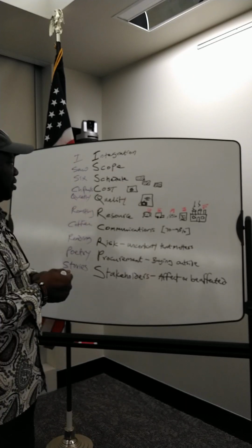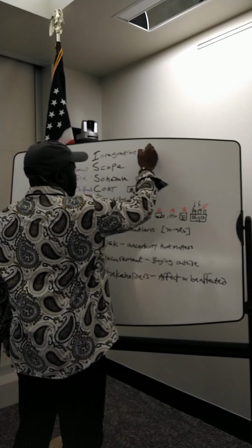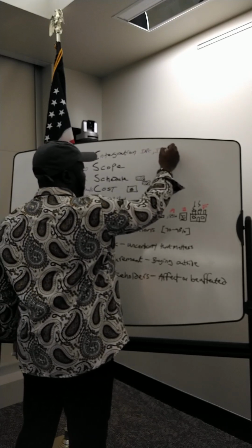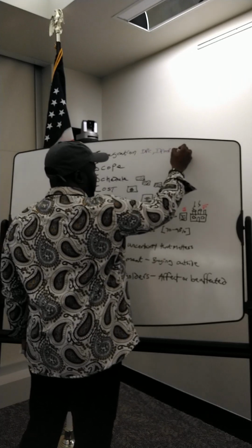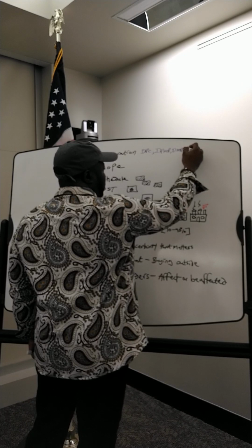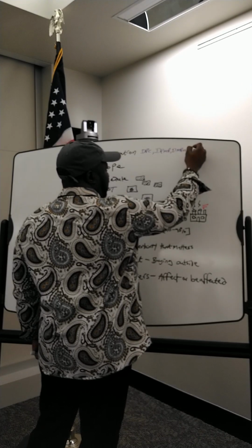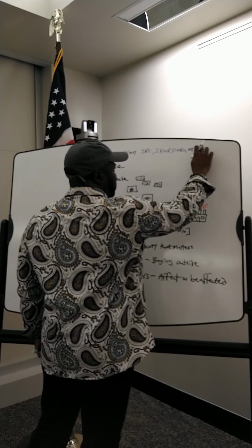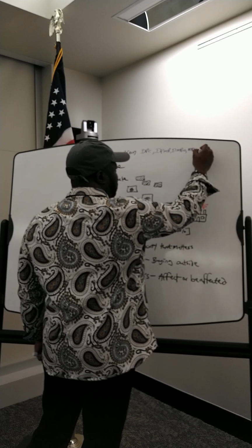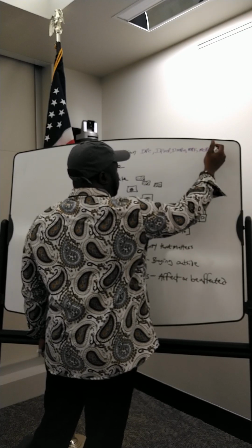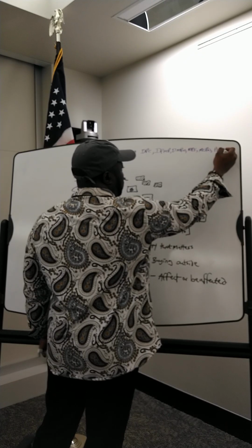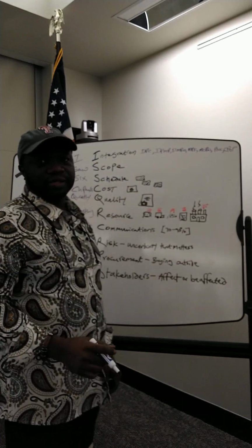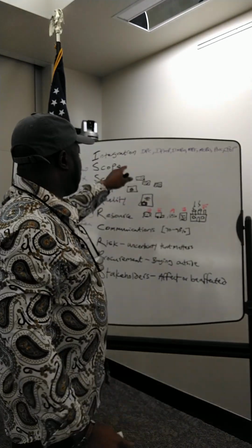This is where we do the following things. We develop the project charter. In integration, we develop the project management plan. We direct and manage project work. We manage project knowledge. We monitor and control the project work. We perform integrated change control, and we close the project or the phase. That is a lot of things, but that's what we do in integration.